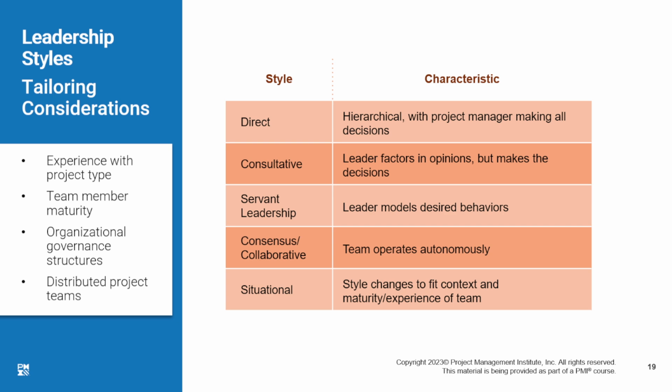Then you have the democratic or participative leadership style, where leaders involve other team members in decision making. So it sort of ensures there's collaboration and inclusivity. Yeah, you can make sure that there's divergence of views, but sometimes the downside is there's slow decision making.